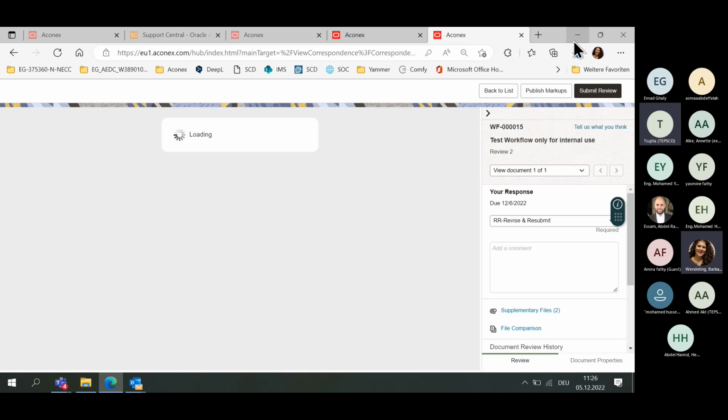That means we will create an Excel list, and all these contract negotiation meetings and so on are covered in the tool. If we create this design document automatically from this tool, we avoid forgetting anything which has been changed to the contract during the negotiations.